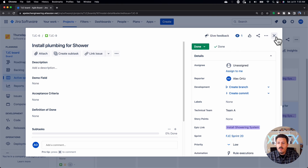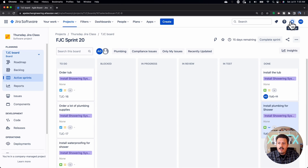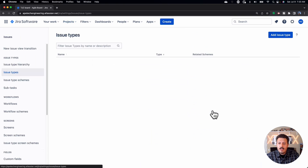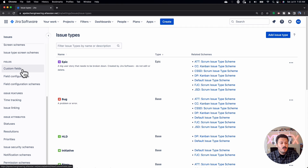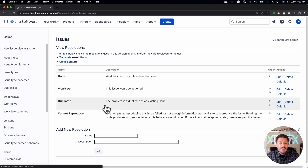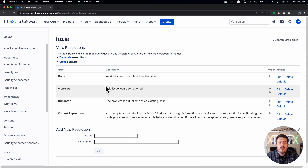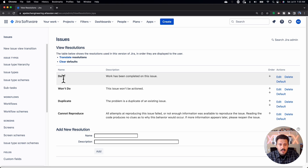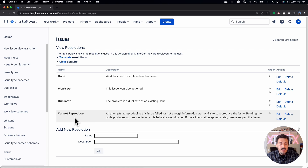Let me show you what that looks like. Go into the gear icon in the top right corner, then come down to Issues. On the left-hand side navigation bar, scroll all the way down and you'll see Resolutions. Once you're there, you'll see the default values available for you and your team to use in Jira — the traditional Done, Won't Do, Duplicate, and Cannot Reproduce.